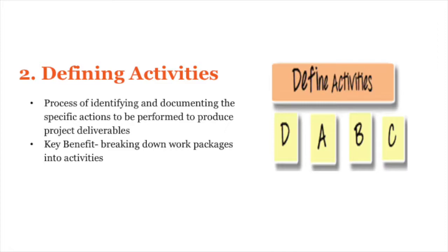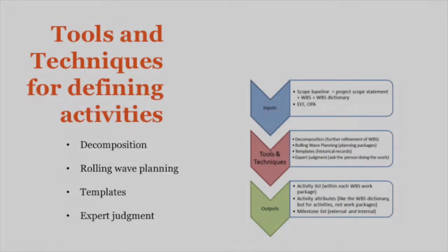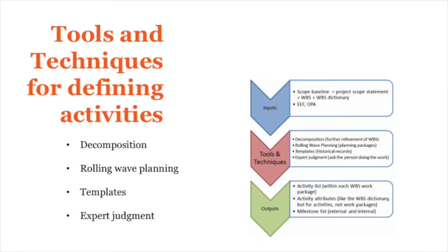An activity or task is an element of work normally found on the work breakdown structure that has an expected duration, cost, and resource requirements. Tools and techniques used in defining activities include decomposition, rolling wave planning, templates, and expert judgment.